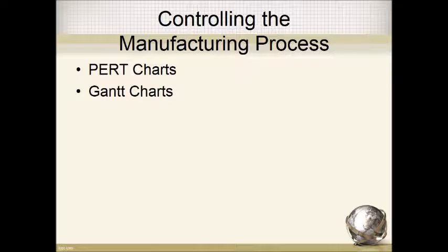For example, if you were to utilize it for a scope project, for example, a business plan, what you'd be able to do is have people at different stages tell you where they are with the progress. Then the manager, the team leader, can take a look at the Gantt chart and see, okay, here's where we are in the process of completing the project, and here's what we need to do in order to stay on track. Oops, we fell behind in this one part. Maybe a team member was sick or had something that took them away from working on something. Well, now the team manager, the team leader, knows that, and arrangements can be made in order for the team to stay on track and to stay on schedule.